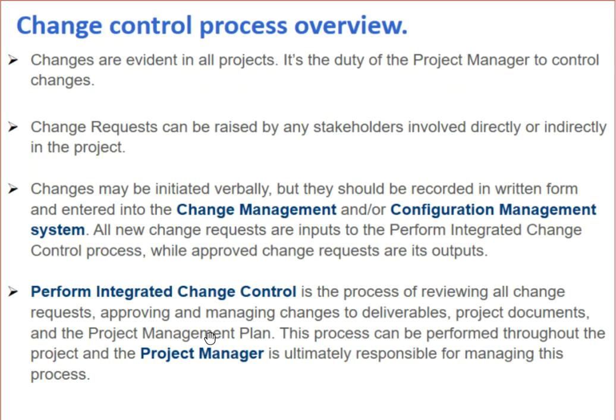So actually, let's discuss more in detail. The changes are evident in our project. It is the duty of the project manager to control changes. Change requests can be raised by any stakeholders involved directly or indirectly in the project. Changes may be initiated verbally, but they should be recorded in written form and entered into the change management plan or the configuration management system.